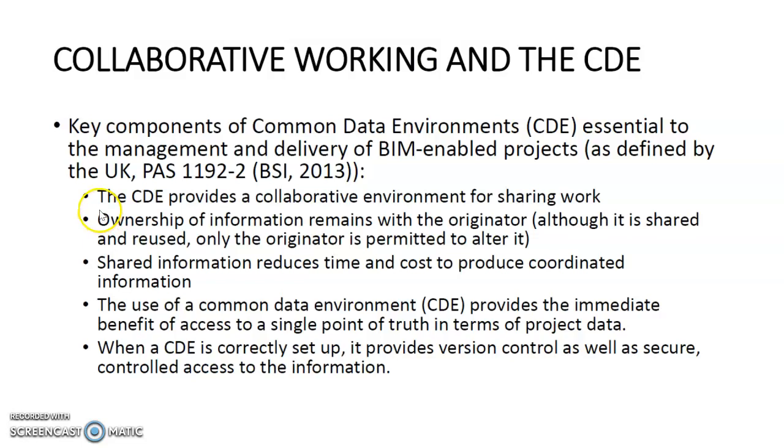The first one, the CDE provides a collaborative environment for sharing work. Ownership of information remains with the originator, although it is shared and reused. Only the originator is permitted to alter it. Shared information reduces time and cost to produce coordinated information.